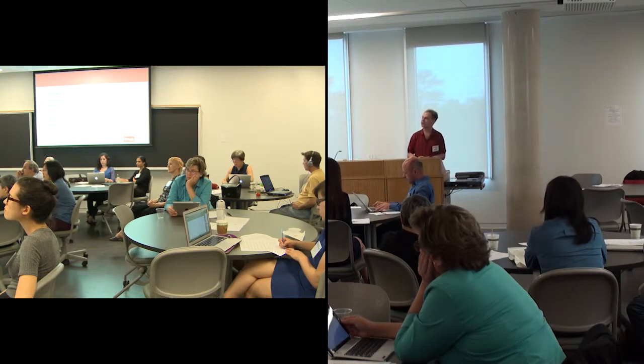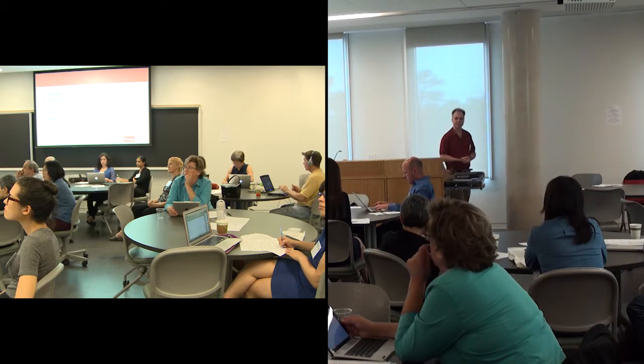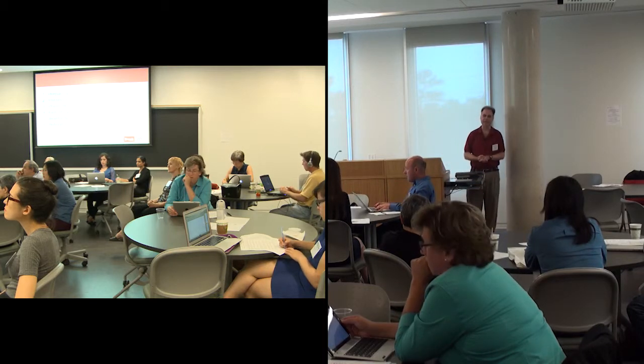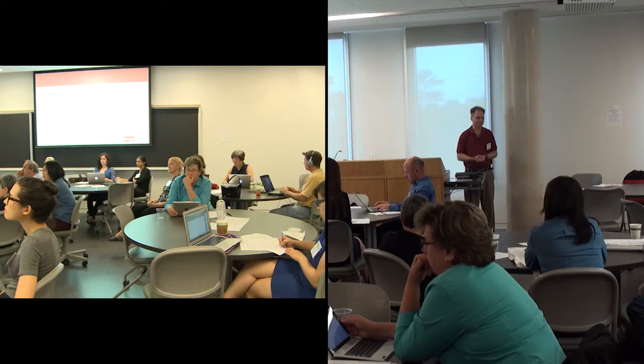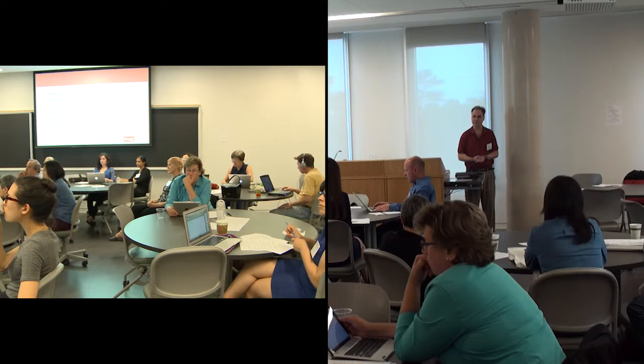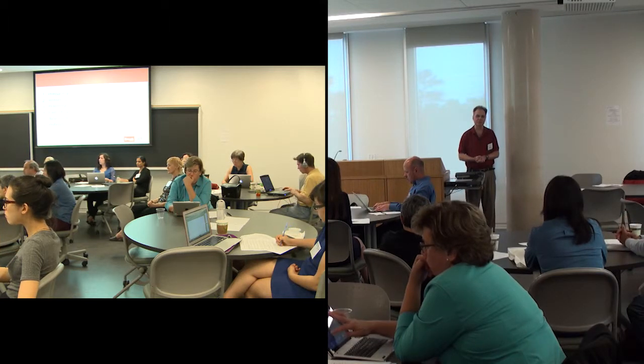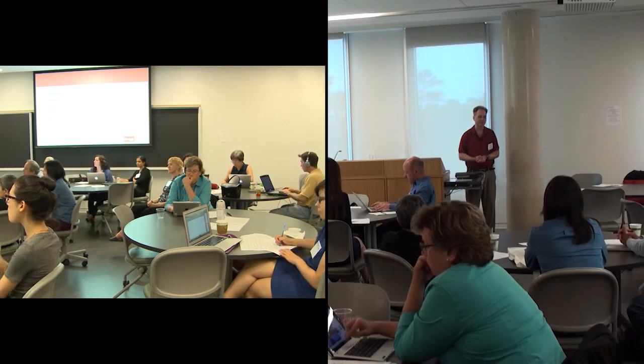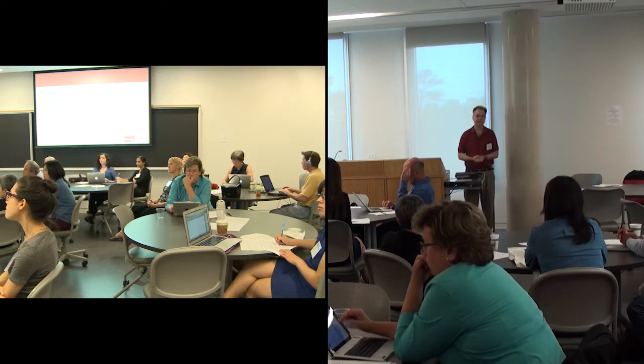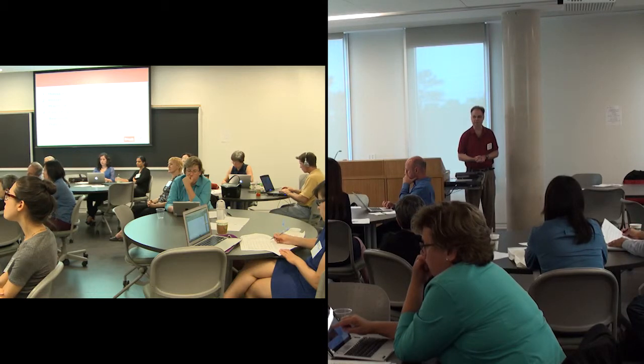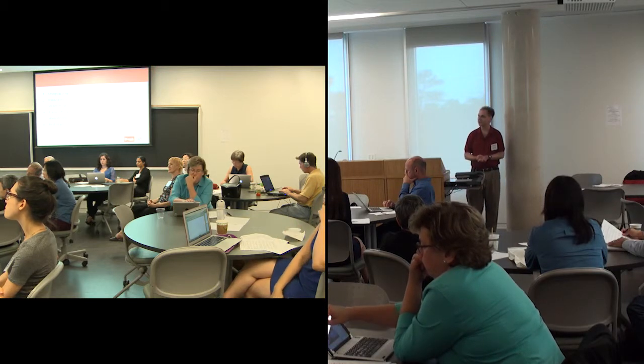The next idea is initiating a project, so actually generating a project idea, which is its own unique stage, separate from the planning stage. And this is where you come up with a general idea for a topic, which might be the instructor or the instructor and students working collaboratively together. But before you actually move into a larger proposal phase where you're teasing out what that project's going to look like in terms of planning it, you are asking yourself, is this a feasible idea that we have for this project? And if you've discovered that it isn't, then you haven't gone through a whole series of planning steps which have taken time. So it's important to have an initiation process.